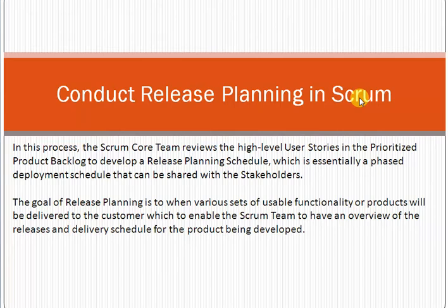Then what is the difference between the Scrum based approach and the waterfall approach? In the Scrum approach, the customer will get the feedback or output at a very early stage. He will be getting the deliverable at a very early stage. So it's a peace of mind, and as a vendor, as a software house, you are also getting the customer's feedback at a very early stage. So this is a peace of mind for you as well, because if there is any mistake or any modification needed, you can get it at a very early stage.